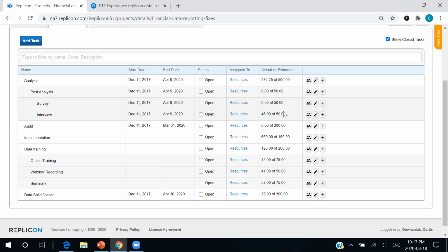But on the other hand, oh boy, implementation, we are quite a bit, 4 times almost, or even more than 4 times our allocated estimated hours. And we are very much hemorrhaging time on this project. So this is a good indicator that we need to bring the hammer down and really close out this task so we can move forward with this project.